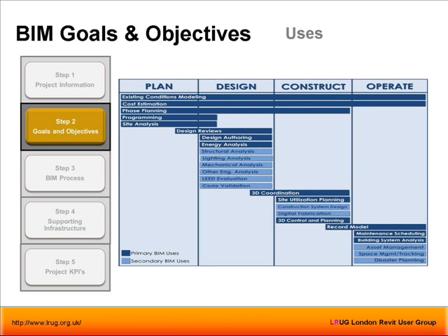Yeah. We need to specify the level of expectation from Clash, so that if you're only going to model pipes over a certain size, then that's part of the BIM execution plan, so that you know that anything below a certain size is schematic, and any holes need to be identified, the ownership of those holes, who's in control of cutting those holes through load-bearing walls. So it's not just about the information, but also who is going to develop it and who's going to own it.